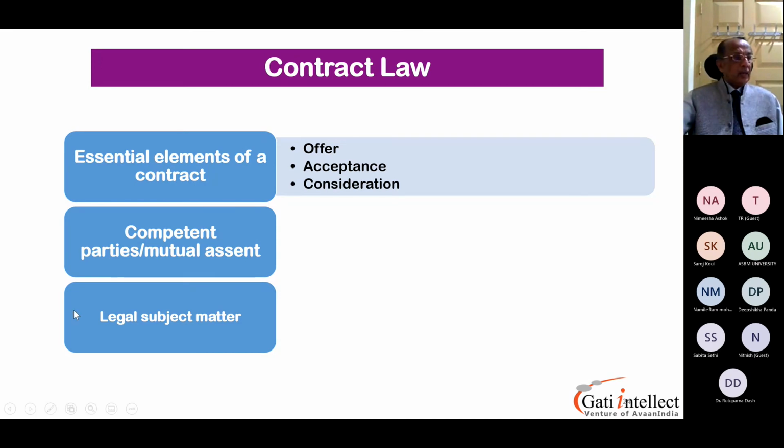Like what I said yesterday, when contracts are made, it's essential that apart from the legal counsel, the applications also should be incorporated, for which you've got to have people who are competent enough and have experience in contract management, like the project managers and the operation managers. They should be part and parcel of it because they are the only ones who can give the application perspective of a contract.